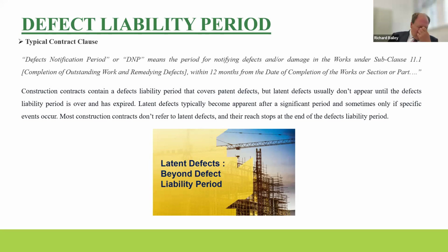But if it's latent defects within the works or design as well, let's not forget that latent defects can be design related, quite often are design related. It will always end up, in my experience, and other members of the panel may comment differently, that you start to write to the parties, and then usually it's going to be considered a form of a claim on their insurance, because they'll have insurance for their damages or a claim against them. And we'll get into the whole process of reviewing that claim and pursuing that against them, because they will start to talk about how, especially if it's materials and workmanship, such a long period of time has passed, the plant has been in use, the property's been in use, that there are obviously intervening causes, there's been other damage done to the building. So we have to start to look at expert evidence and engage to try and find the actual cause of those problems. So that's, in a nutshell, how we would deal with them from a legal perspective.